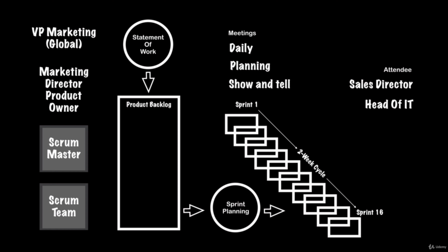So what we did was we made sure that each task was not more than 2 days. And we didn't work at 100% capacity. There was flexibility. So the idea was you started on a Monday, but the work doesn't really gather pace until the Tuesday. And by the end of the 2 weeks, towards the Friday, you should have at least a day of flexibility. So it's not like you have to ram-pack all the tasks into the 2 weeks and you're not able to finish it.